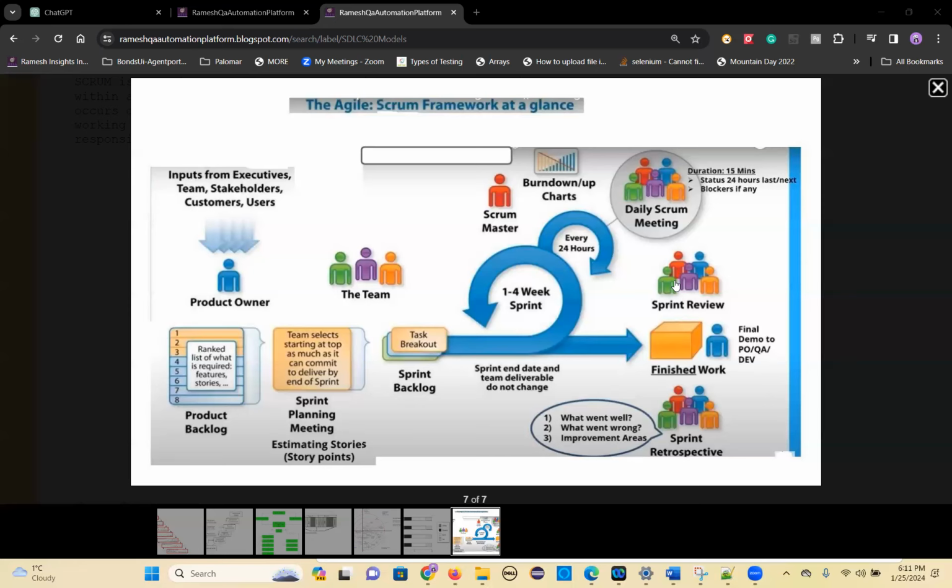In this sprint they will log how many hours you worked and how many hours remain to finish the complete task. So they will split this user story. For this sprint, they will log one user story, and for the next sprint, they will report one more user story for the continuation. That's how it will be moved. If there is one user story spanning between two sprints, they will create another user story for the next sprint for the same task.